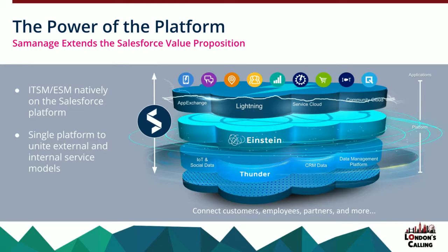Again, there is an excellent resource that Salesforce has provided that will help you prepare this presentation. Depending on the size of your organization, if it's a large enterprise organization, you will have to do this again and again for different stakeholders to get their buy-in. So I wouldn't underestimate the effort involved in doing this. You may have to provide a high-level cost estimate and then justify the cost by explaining or demonstrating the ROI. Finally, you would need to have a plan to ensure business continuity.